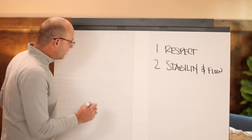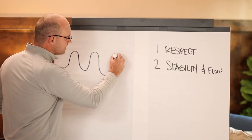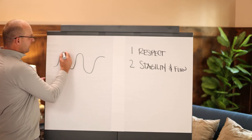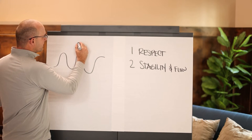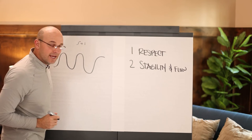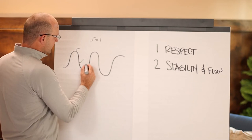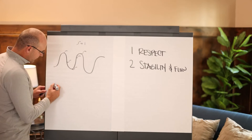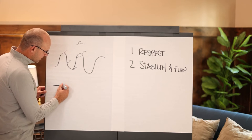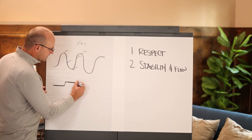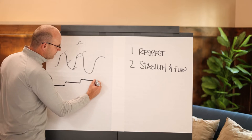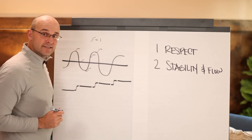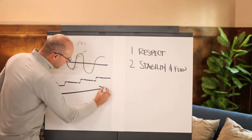If you are in a chaotic environment where on your project site everyone's changing this way and that way and things aren't consistent, and you want to make a little improvement effort — you're improving one day, then the next, then the next — you're all over the place. You're not improving anything; you're in chaos. But if you have a stable standard system, you can do an improvement effort, and now you have a new baseline. Improvement effort — new baseline. Improvement effort — new baseline. So instead of flatlining, you're constantly on an upward trajectory.